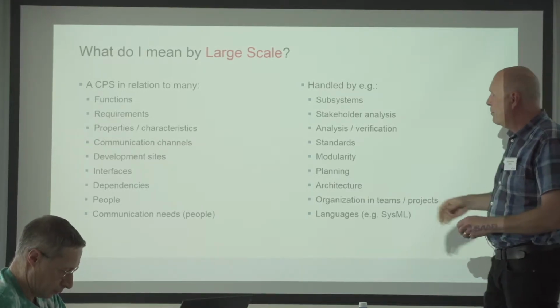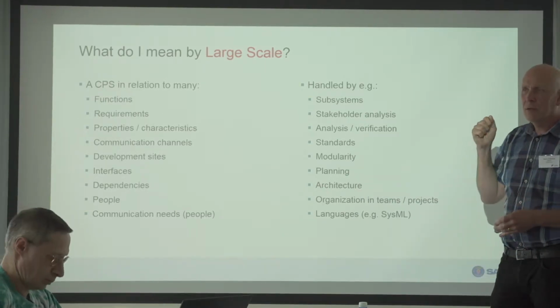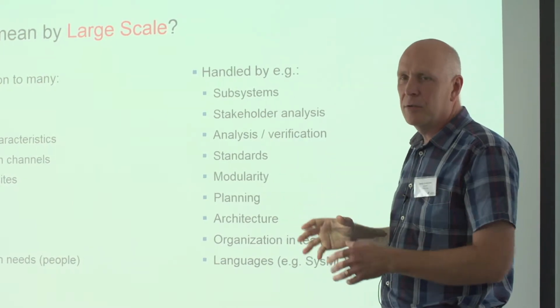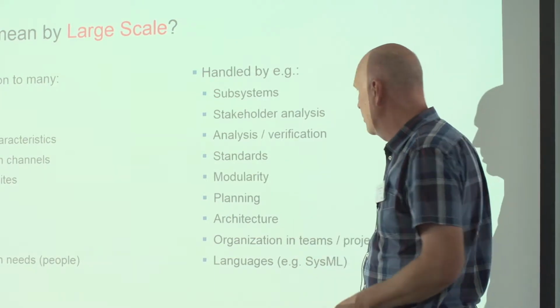Interfaces: there, planning is very important. You should really do a good job with interfaces so they are stable, so you don't have to change them, because that's very expensive to do late.